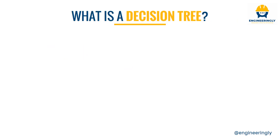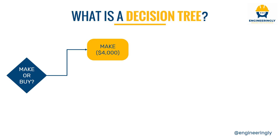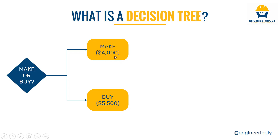For example, assume you have a scenario to either make or buy something. If you make it, the cost is four thousand dollars. If you buy it, you pay five thousand five hundred dollars. The make option is lower because you use in-house resources. If you make it, there is a 65% probability of making a profit of fifteen thousand six hundred dollars, and a 35% probability that it fails and you lose six thousand four hundred dollars.